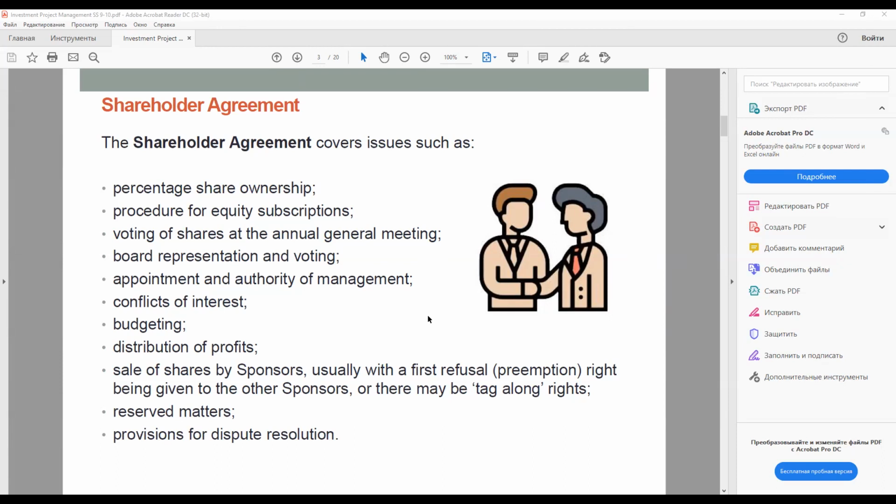As I said, 50 to 50 joint ventures are not uncommon in the project finance field, and they give rise to obvious problems of decision making. Even in cases with more sponsors, it may still not be possible to get a consensus where a minority partner can block action on the major issues. Arbitration or other legal procedures are seldom a very practical way forward in this context. Clearly, if there is a deadlock, one partner will have to buy out the other, for which a suitable process has to be established. One approach is to require both parties to bid for the other party's shares, with the highest bidder buying out the other sponsor.